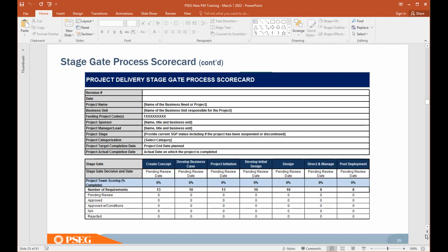Next slide. Suresh, quick question on this approval. For every gate, for example, if I have a concept and would like to have this approved or reviewed, who is the project governance board, or what is the cadence? How frequently do you meet so that we can propose those? Okay, now you just send it to the IT EPMO shared mailbox. So that is the first step.